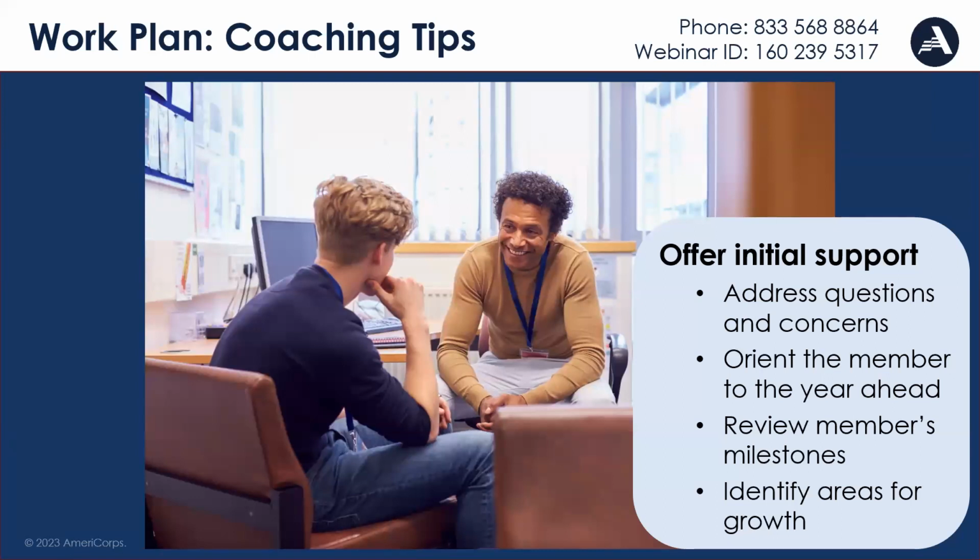Review the member's incremental steps or milestones to make sure that they're clear, they're the right number, and that they align with VISTA principles. Because another important consideration is, how realistic are the member's interim and final milestones, and do they account for common things like busy schedules, timing, or use of personal or medical leave? And then as a supervisor, you also want to be sure to identify professional development opportunities to help build the member's skills.